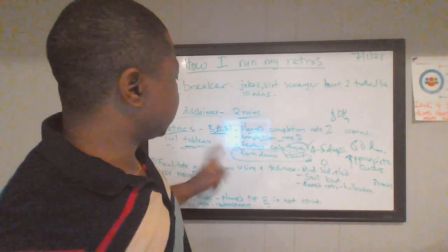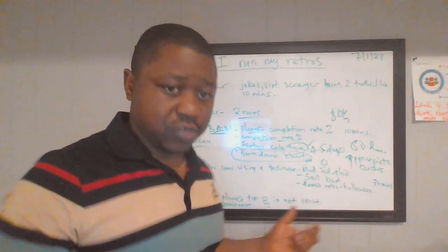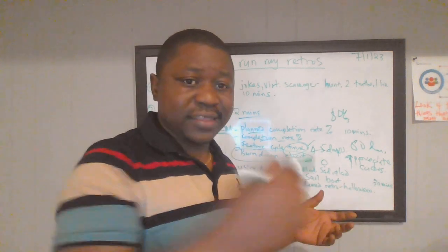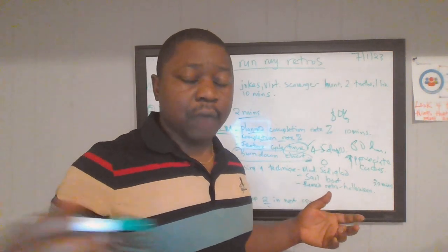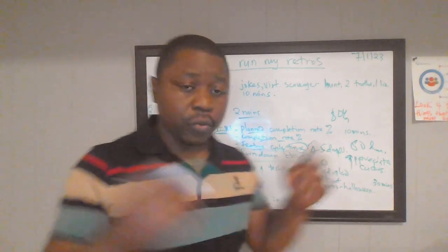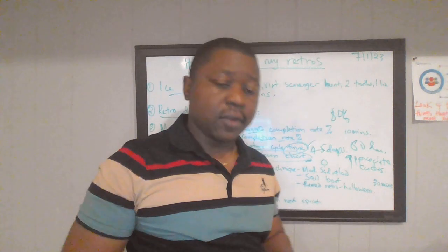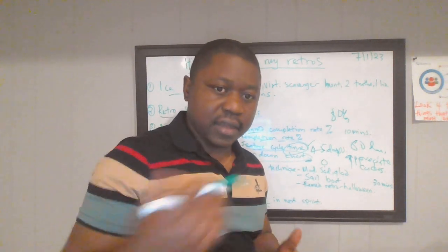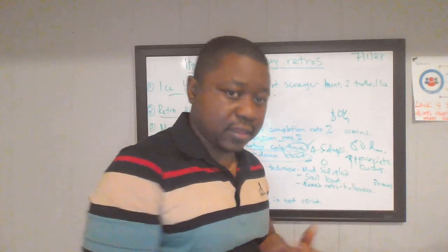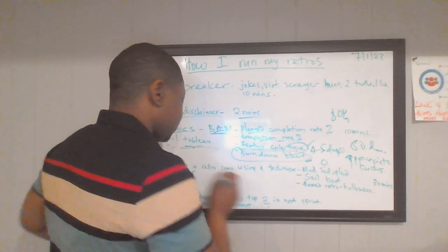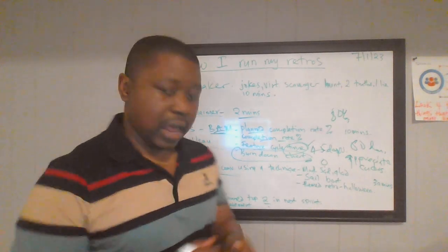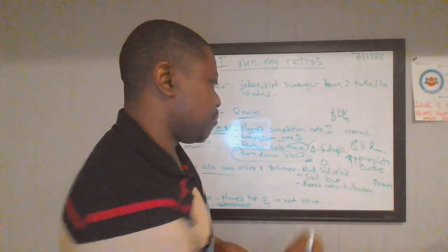Another metric I always pull up is the burn down chart. How do we complete our burn? How did we complete our stories during the course of the sprint? Did we get all our stories accepted towards the end, or were we accepting or finishing up our stories systematically as the days were drawing towards the end of the sprint? If not, why? That's where the retro conversation comes in, and I use a technique such as Mad Sad Glad